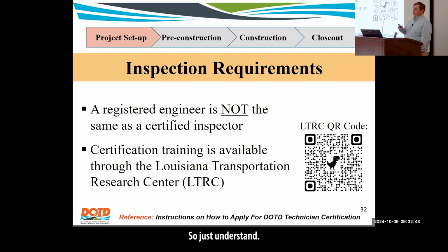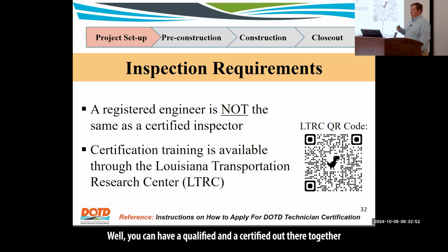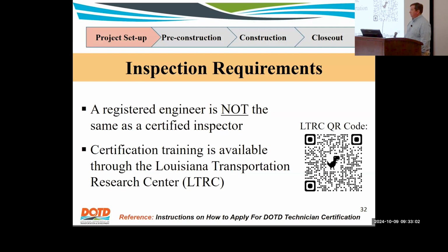So just understand, yes, you may have a qualified inspector. I just got done telling you he's got to be certified to be out there on embankment. Well, you can have a qualified and a certified inspector out there together so that the qualified technician at least gets experience so that he can meet the certification requirements. Don't forget bullet one. Yes.